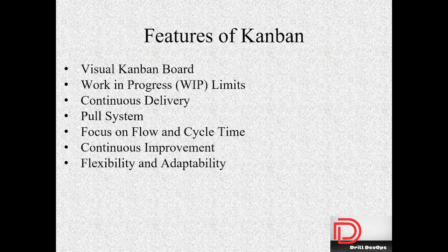how we are going to do them, with all the technical and theoretical details, step by step. Then we give the QA or testing reports we have done, how it was achieved in the staging environment and how we are going to implement it in the production environment. We also give a rollback strategy, where if something fails during the upgrade, we explain how we will roll back and how it will not impact any teams if the production upgrade fails.